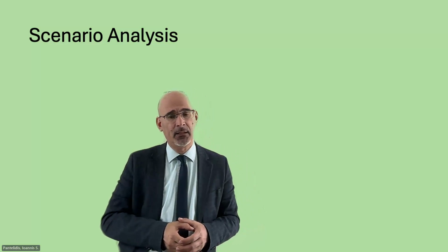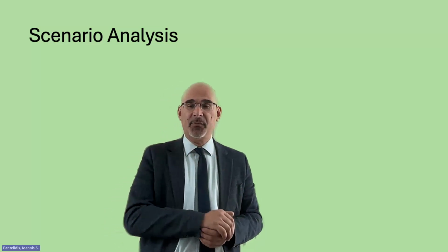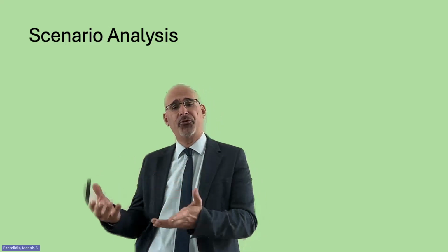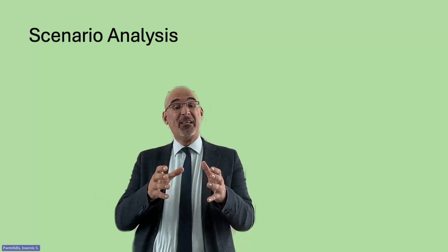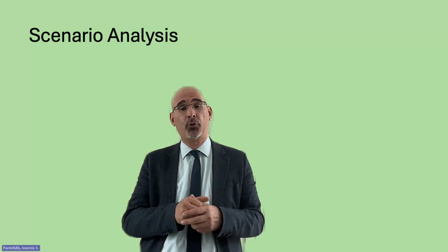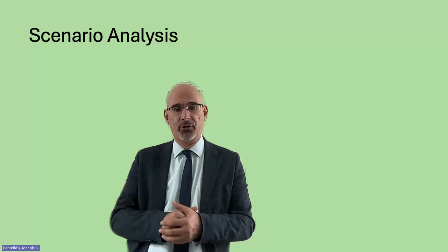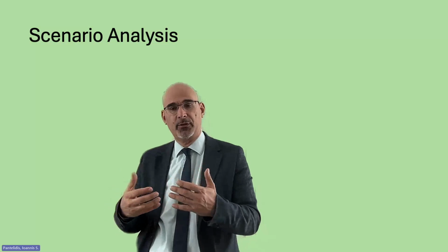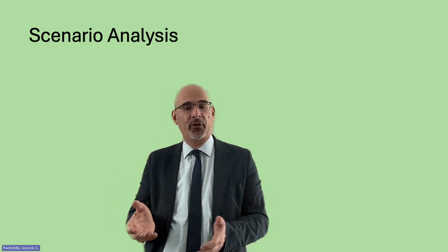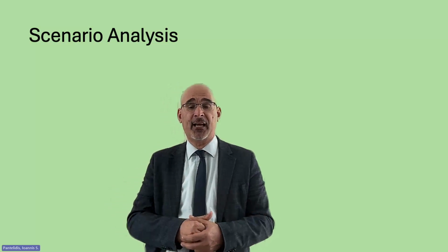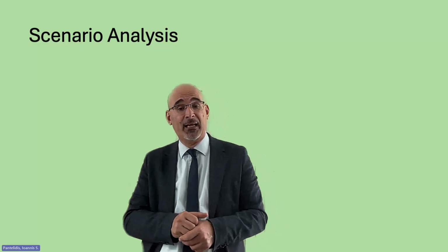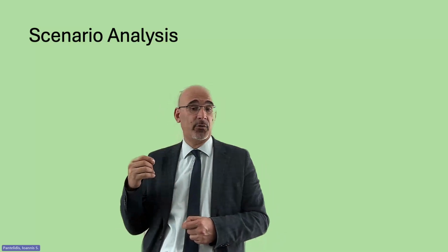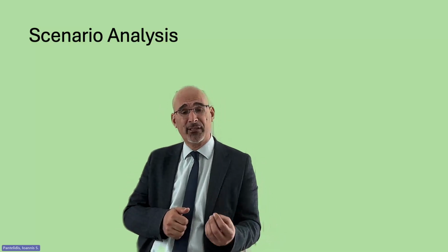If we take risk management as an example, scenario analysis there is a technique used to evaluate how different future events or conditions, especially adverse conditions, could impact an organization, a system, or a project. Instead of focusing on a single forecast, again, we explore a range of possible scenarios. Things like economic downturn, a natural disaster, and we try to assess how risk might materialize and what the potential consequences could be. In practice, this allows us to identify vulnerabilities and critical risk exposures.